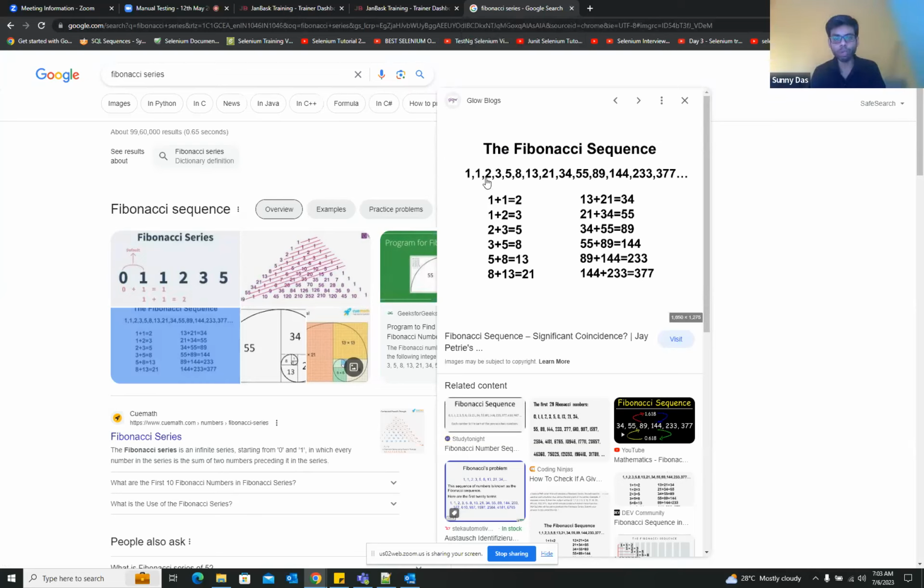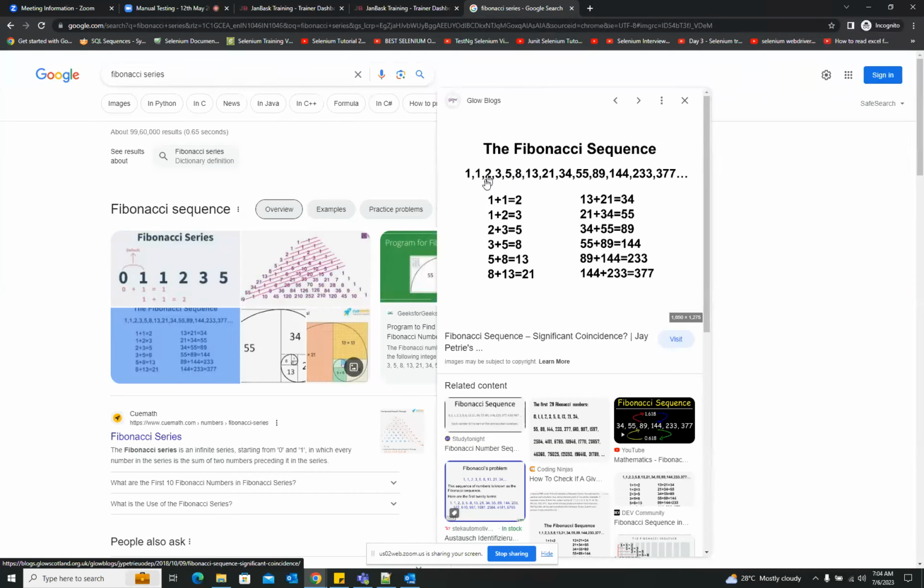If you're giving the story point as 2, that means it shouldn't take more than say 3 days. If you're giving the story point as 1 or 2, then this story is not that complex. It also depends on how many people are working on that story.